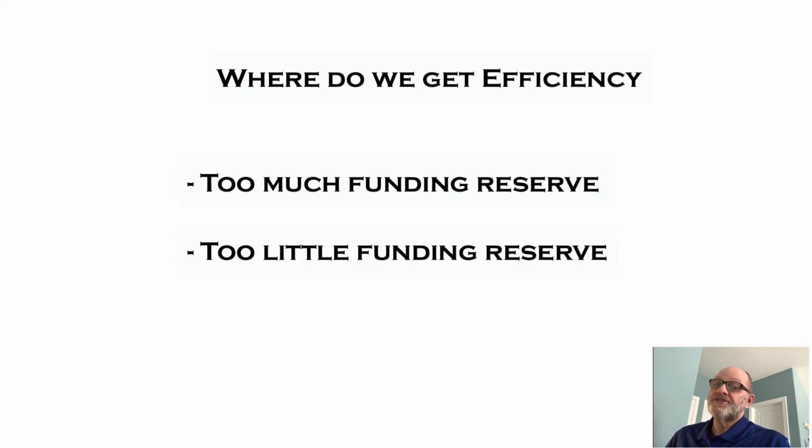Now, if we forecast too low and we discover late in the project that we need more money, then typically that comes from existing projects or projects we haven't started yet. So now we take money from them and that slows them down dramatically and then lowers their efficiency. Now, as we've seen, in both of these scenarios, we have efficiency drops.